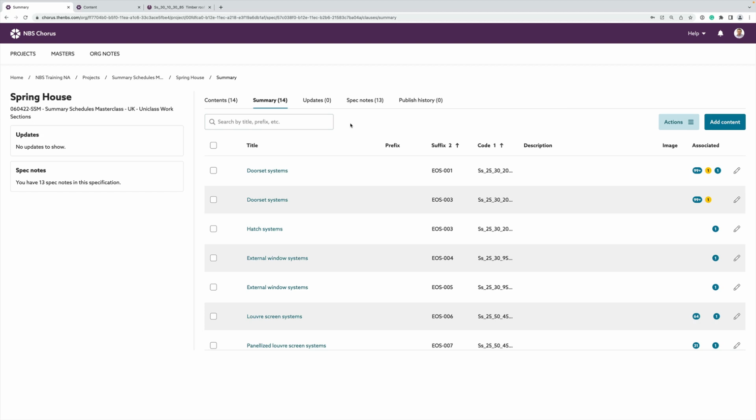You can use it to ensure your specification intentions are within budget. You can cross-check as you go through different stages of the project to ensure that they're still within budget. You can use it for when you're planning contractor design packages, looking at different areas and planning what you'll have full design responsibility for, and which areas you're planning to write performance specification requirements for the contractor design packages. You can use it to coordinate specification intentions with your design team, as well as defining cross-referencing coding approaches between drawings and the schedule.